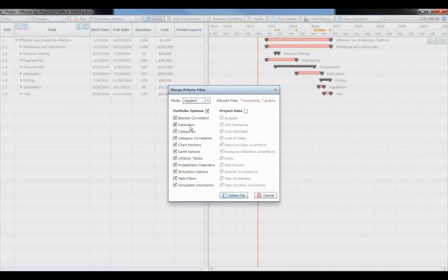So if you say you've had just a schedule update, they've had some progress. Polaris will take project progress into account. So if you have activities that have finished, if there's risk associated with that, it doesn't take that into account. But you can pull lots of different information from the project data. You can pull anything you put into the model from past models into the new model by just using this merge functionality, and it'll bring all that data over very, very quickly.